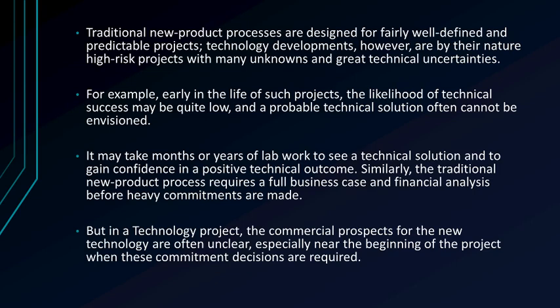Similarly, the traditional new product process requires a full business case and financial analysis before heavy commitments are made. However, in a technology project, the commercial prospects for the new technology are often unclear, especially near the beginning of the project, when these commitment decisions are required.